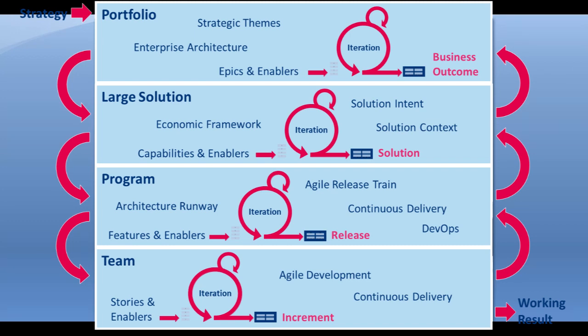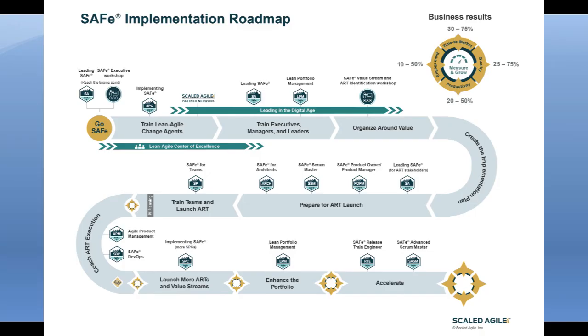Here you can notice that one role is new, that is the release train engineer. The other ones, product owner and Scrum master, are the previous roles which are already present in the Scrum framework. There is regular program increment planning, typically spanning 8 to 12 weeks. Here again you will notice that the planning spans 8 to 12 weeks, which is a huge number in Scrum as well.